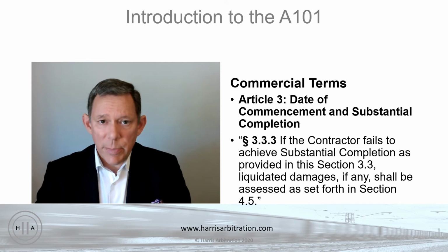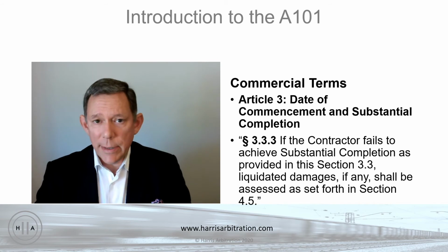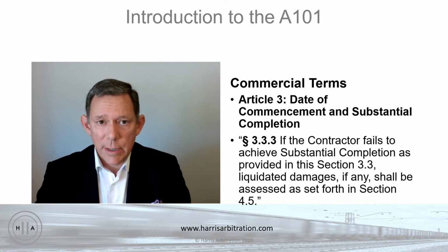The owner's obligation to pay would therefore be triggered, and the owner would have to pay the contractor the contract price less whatever damages the owner incurred as a result of the contractor's breach in failing to install those two doorknobs. And that would simply be the cost of having somebody come in and install the doorknobs that the contractor failed to install. So not very much, probably.